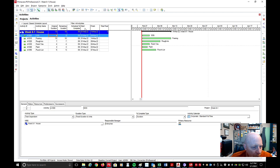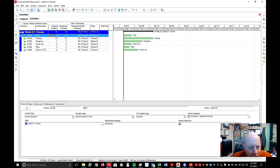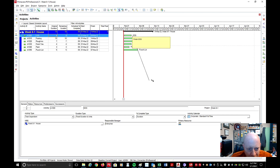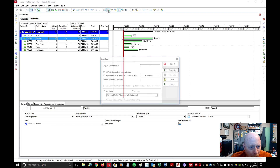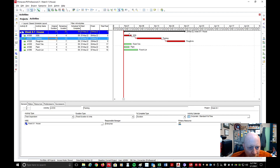I've got Original Duration, Remaining Duration, Start, and Finish. Right now it's going to take me 14 days to do this, but I have no relationships yet. I'm going to stretch this out. I'll mouse over until I see the little crooked arrow, left-click and hold, and drag to connect to the end of framing. Then I'll do the same thing — connect the end of framing to Rough-Ins. Now I'll click the little clock at the top to hit Schedule, and it pops the activities out as a schedule.